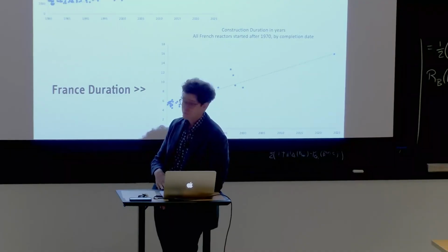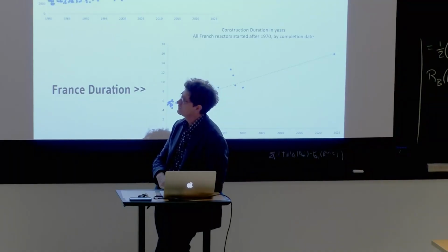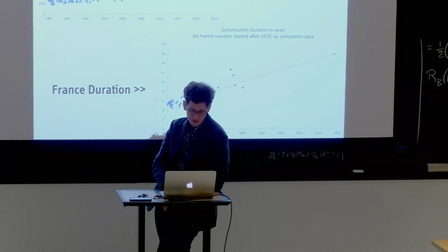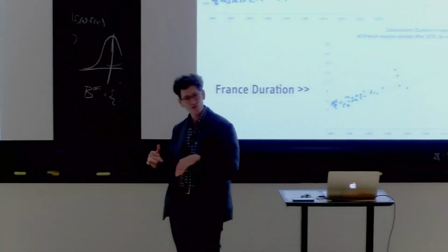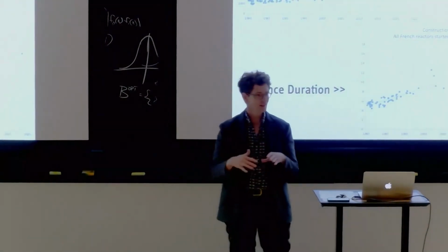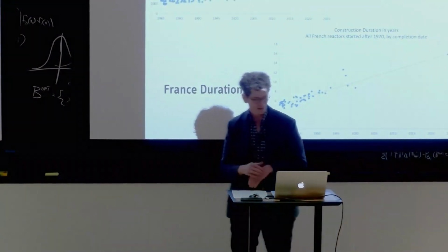And there were a lot of challenges in getting that reactor to be built correctly. Giant lawsuits, issues related to the casting of the head, the pressure vessel, that had carbon precipitates in it that may limit its life. It was a big mess. They also had the first, I think, entirely digital control system, and it took a long time to certify all the software. So there are a lot of issues associated with that reactor.